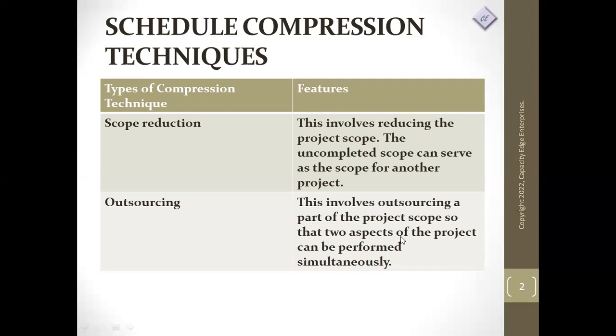So outsourcing means while we're working on a part of the project, a contractor will be working on another part of the project. So you can say in a way it's similar to fast tracking. But just in this case, it is another party, a third party that will be working on another part of the project at the same time. So while we do the recruitment part for the HR in-house, the payment part can be done by a third party. So both of us are working simultaneously on those two parts, and that will give us the opportunity to be able to complete the project on time.